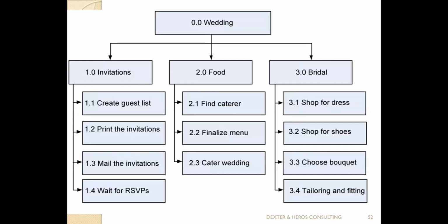For example, I want to provide information for the phase one, invitation. I can tell you that there are 4 works to be done in this phase. It will last for 7 weeks. It's going to cost so amount. I will need up to 4 people to work there. And then it's expected to be completed between now and so time. I've provided you at least brief details about that phase.